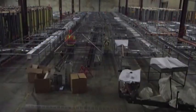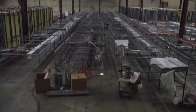In our trade, we should be able to do about 200 foot, 250 foot of pipe, a 3/4 inch conduit a day. That's what we would be expected to run. And at the warehouse, there were some days I was getting 650 foot of pipe. So, you take that, and each corridor would have about 4,000 foot of pipe, which would take maybe 2 weeks for a guy to do, and it was taking me probably 3 days.